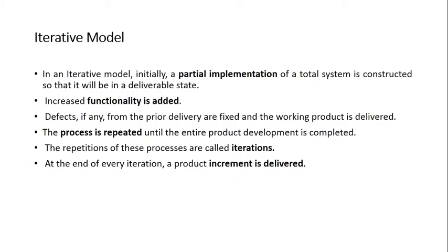Either in the waterfall model, or in the prototype model, once the prototype is developed in order to get the requirements, we then develop the entire software and deliver it to the customer. So the complete software was built all together, while in this case we are not going to build the complete software in one go. We will be making partial systems in the form of iterations.